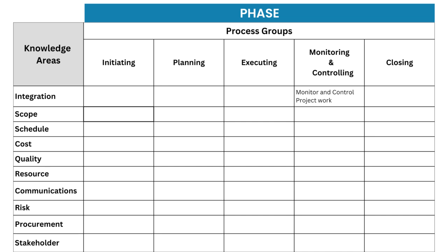Controlling focuses on determining corrective or preventive actions, implementing changes, and following up to confirm that performance issues have been resolved. If a project deviates from its planned schedule or budget, corrective measures such as change requests may be necessary to bring it back on track. These processes run parallel to execution and involve comparing actual work to the project plan. Discrepancies are addressed through necessary adjustments to ensure project objectives are met.